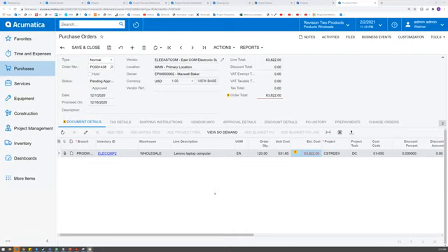So let's get into this area, moving back a little bit from the engineering side, right? Once they go on site and they say, yeah, I think we need some materials for this project to continue the repair, or they have some materials that are required for the project. On the purchase order side, project managers can issue the purchase orders, and the system automatically checks the available budget in this particular area, for example, for the designated project and designated tasks in a particular project or not.